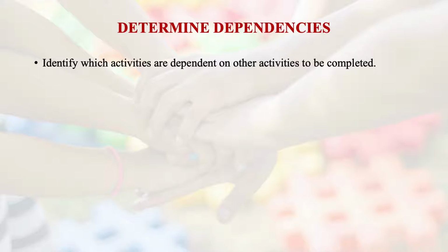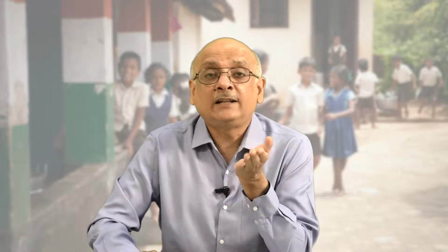Identify which activities are dependent on other activities to be completed. If you can define that, then you will know which activities can be done in parallel, and which activities have to follow a particular given activity. So this is important: determining dependencies.